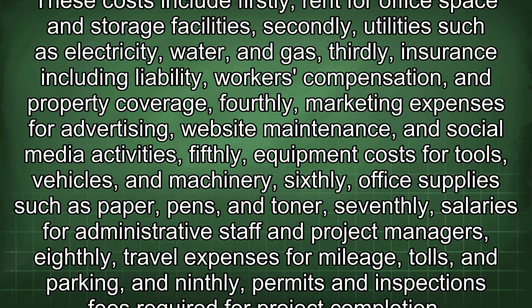or labor. These costs include, firstly, rent for office space and storage facilities; secondly, utilities such as electricity, water, and gas; thirdly, insurance including liability, workers' compensation, and property coverage; fourthly, marketing expenses for advertising, website maintenance, and social media activities; fifthly, equipment costs for tools, vehicles, and machinery; sixthly, office supplies such as paper, pens, and toner; seventhly, salaries for administrative staff and project managers; eighthly, travel expenses for mileage, tolls, and parking; and ninthly, permits and inspections fees